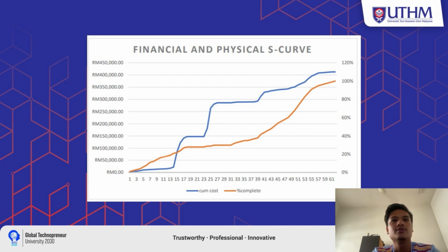The blue grid line is the cost and cumulative cost, and the orange grid line is the actual cost, which is the complete cost. As we can see, when reaching day 61, both of the lines have reached 100%. Although the blue one is slightly higher because we predicted it, it does not go any higher than that after the completion.